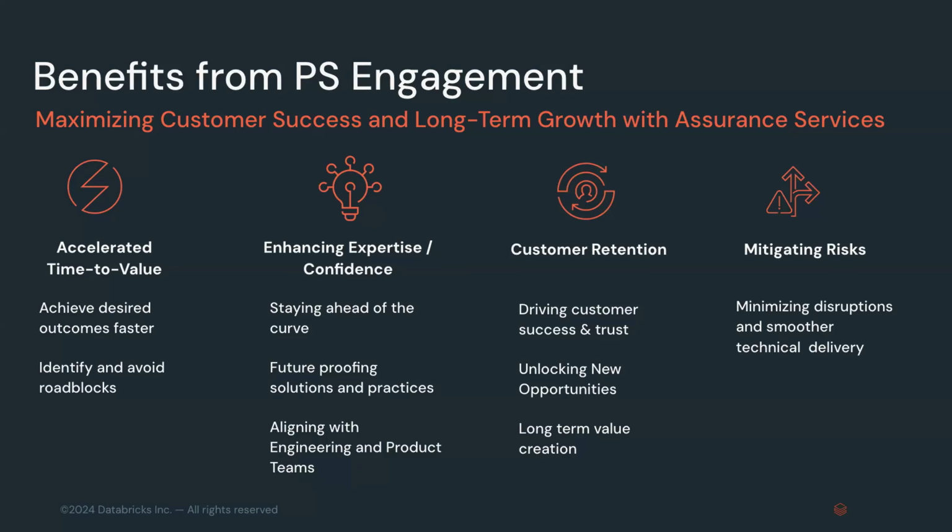And that comes in multiple flavors: validating that the code is still doing what you expect it to do, but also validating that the business outcomes are the same, that the numbers in the reports look the same, and getting that UAT cycle in there too. Your customer of the migration needs to validate that.